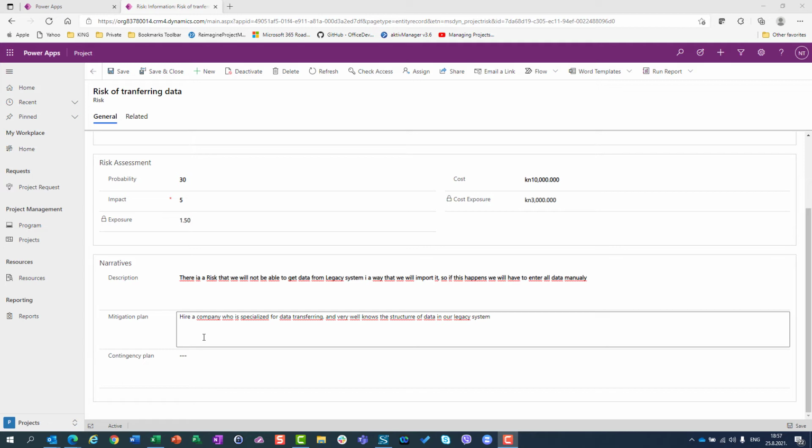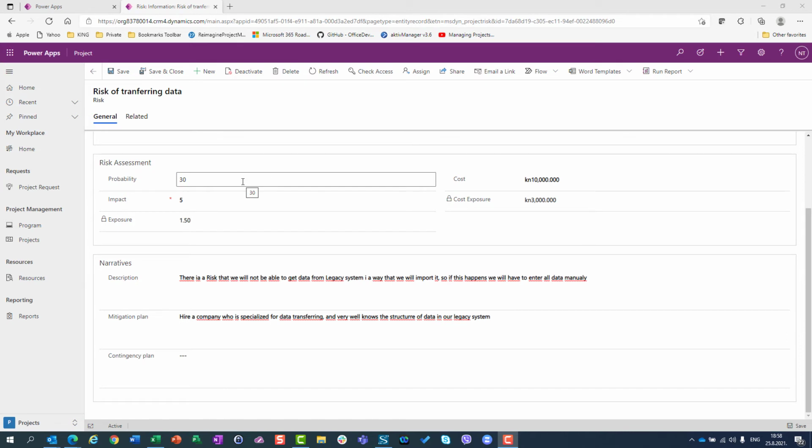It means that those sharks are going to be attracted by that meat, and maybe they will eat that meat, but they are not going to attack our tester. But it doesn't mean that they will not attack for 100%. Maybe some shark will see our tester and try to attack him or her. So by feeding those dangerous animals away from your testing area, you are decreasing probability, but you are not avoiding the problem fully.